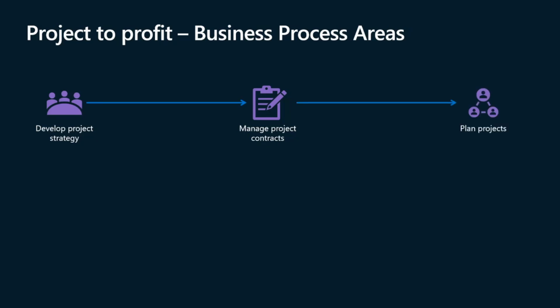Plan projects. Tracking resources and schedule is crucial for maintaining project health and ensuring a successful outcome. It covers regular monitoring, so scheduling regular checks to compare actual progress against your baseline. This will identify deviation early and allow for timely corrective action. Resource allocation: ensure efficient allocation of resources. Utilize project management tools to track resource usage and availability.